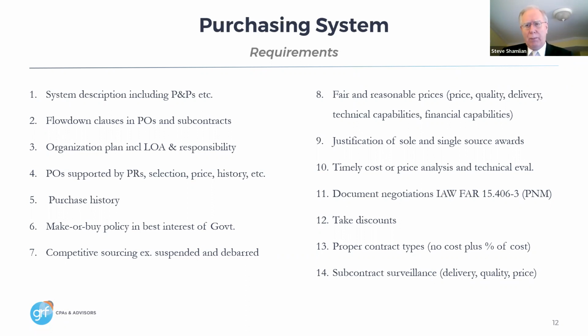So when we submit our proposal to the government, our price for this subcontractor should include the expectation that we're going to get a 10% discount, just like we've done in the past. Hey, Steve. And number 3, what does LOA stand for? Lines of authority. Okay, thank you.